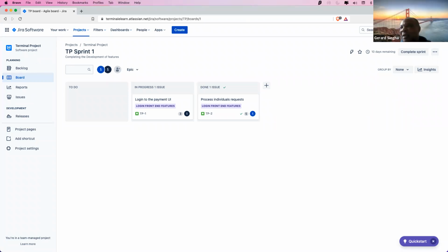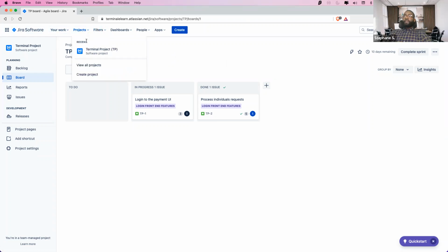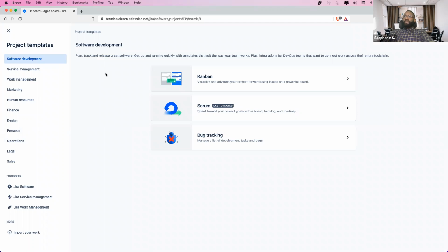Yes. All right. So this is where, when you create an account, I'm going to give you a quick rundown of where you're going to be landing. Once you create an account, it's going to show you this specific interface. It gives you the opportunity to create a new project. You could either create a Scrum project, which in your case is more likely, or a Kanban project. A Kanban project is one for which you do not have sprints. You do not have an actual backlog. You only have your to-do, your in progress, and your done statuses. That's it. It's really simpler.